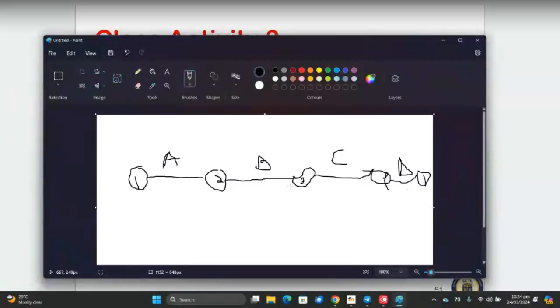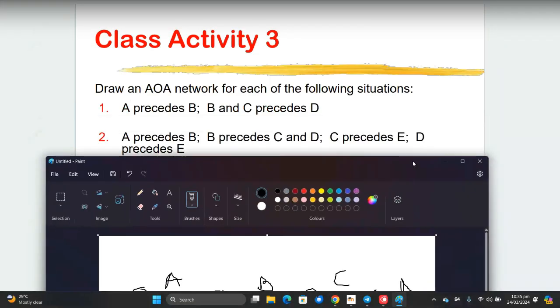So it was event one, event two. Okay, right here, when they mention a task, it should have a precedence and a successor. So at event one, I place A here. Then it says A precedes B, meaning A must finish before B can start. So activity B, we have event three. And then B precedes C. If it's in the question, it says A precedes B, B precedes C, C precedes D. I hope you understand what we are doing.